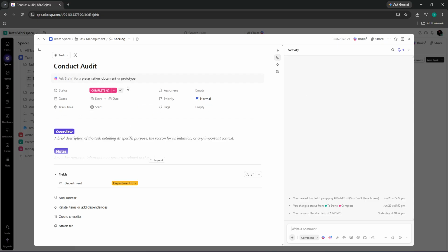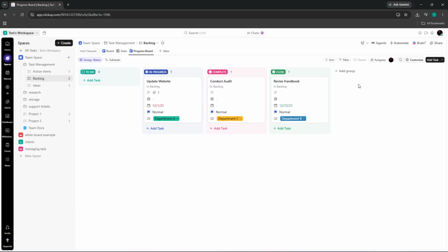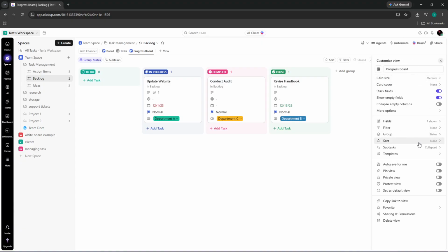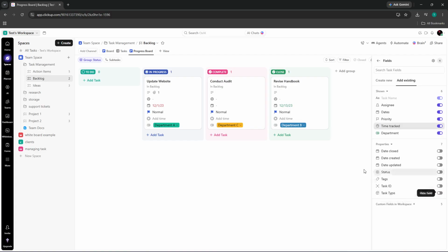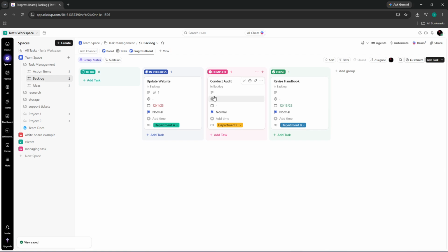If your team uses time estimates or story points, add those next. ClickUp supports time estimates natively, and a custom field handles story points in just a few clicks. Estimates make sprint planning dramatically faster because the team can immediately see how much capacity a given batch of tasks actually requires. Apply tags or custom fields to categorize items by type, feature, bug, tech debt, or by product area like checkout or onboarding. Then use ClickUp's filter tools to display only the items relevant to a given planning session. This combination of categorization and filtering keeps a large backlog navigable even as it grows into the hundreds of items.